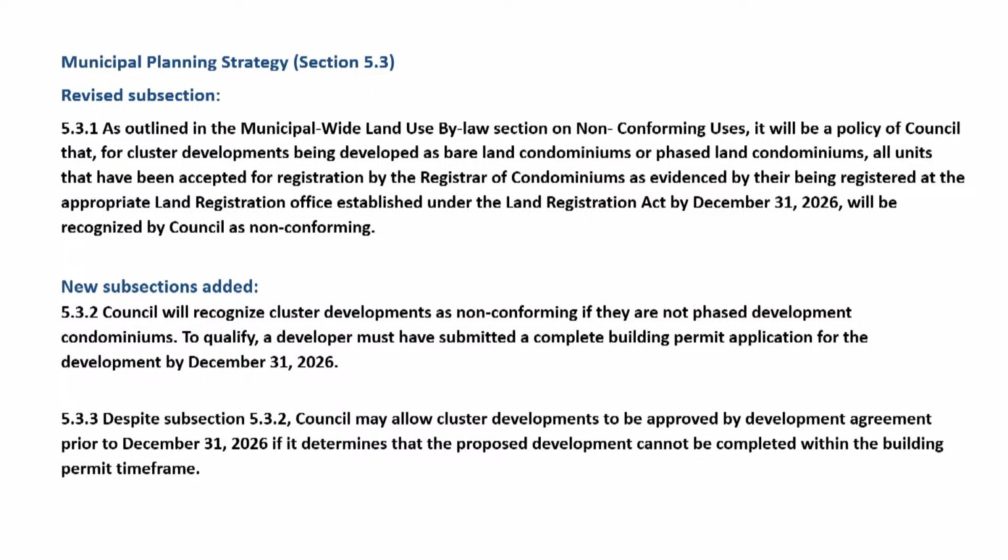After Council's request for revisions, those were some of the revisions that were done based on the report. For Section 532, we provide exemptions for non-phased cluster developments. These developments are exempt from requiring a development agreement until December 31st of 2026, provided they submit a complete building permit application before that date.